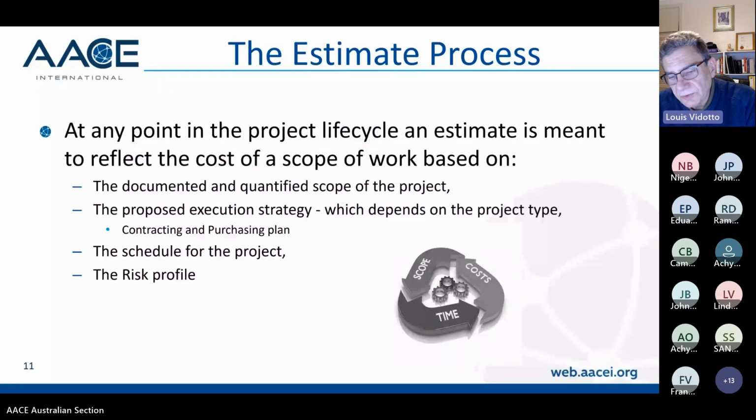When the contract was awarded to the prime contractor, the conditions of contract were such that if the re-estimate of the project was outside what the budget plus 10% was, they'd incur all sorts of penalties in terms of liquidated damages, etc. So when we ended up doing the re-estimate, we were outside the 10% because the prime contractor had really made the process foolproof, and he had redundant piping system, redundant equipment systems. So there's no way that the project could build the job for what the budget was.